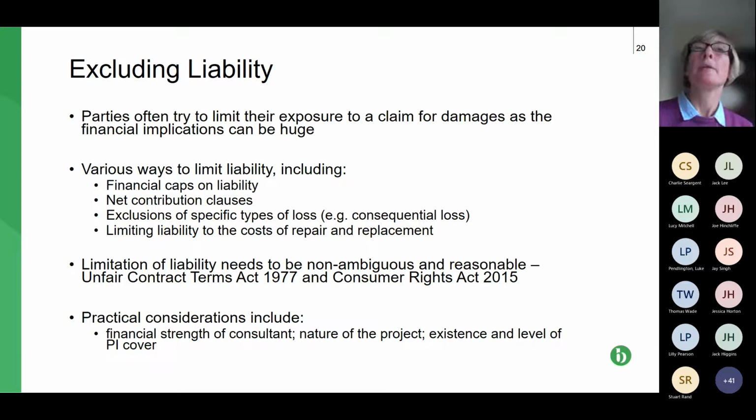Or there may be a clause in the contract that lists the hierarchy in the event of an ambiguity, and typically anything to do with the contractor's tender, particularly anything submitted by the contractor, will be at the bottom of that hierarchy. So just be careful here. These clauses need to be carefully negotiated, carefully drafted, and carefully included in the contract before it's signed.